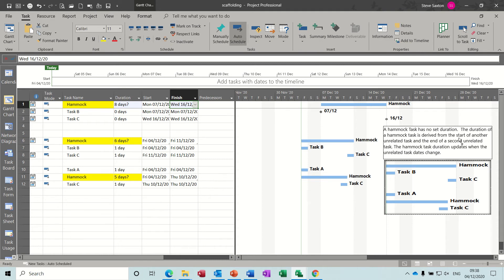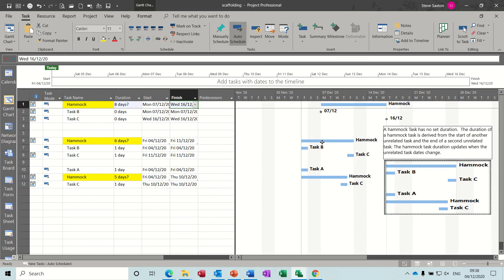Now in this little text box, I've put a description of what a hammock task is. Basically, it has no set duration. The duration of a hammock task is derived from the start of another unrelated task - so we're not talking about links here - and the end of a second unrelated task.